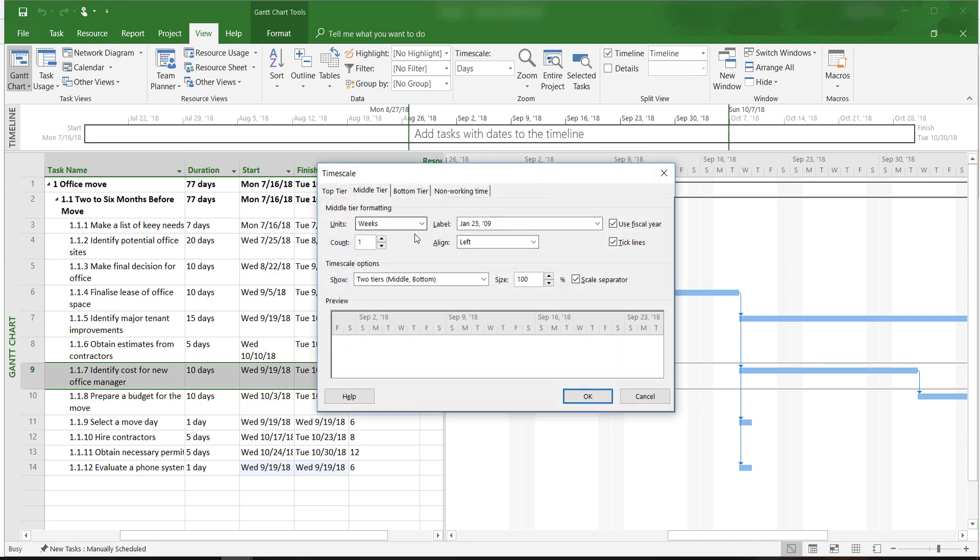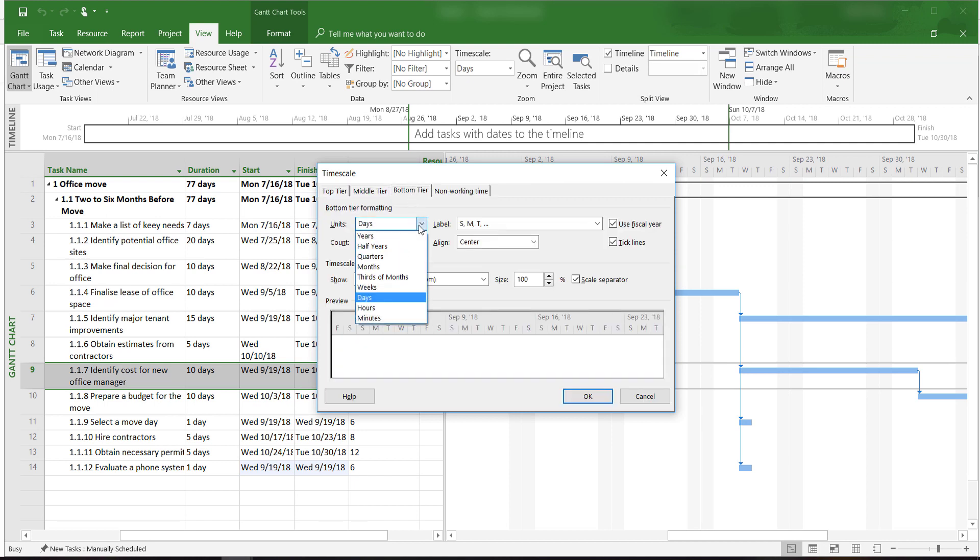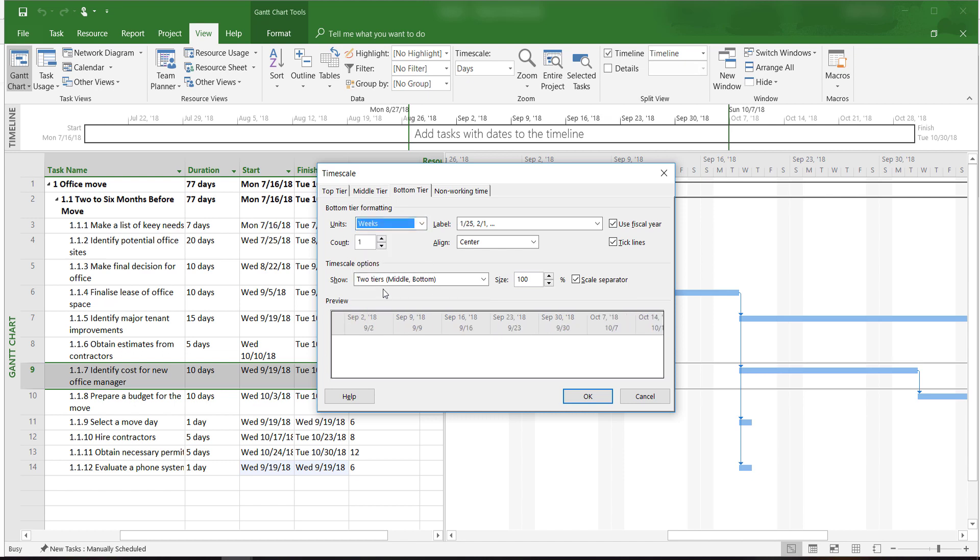We can see the current timescale if we click the bottom tier tab. It's now in days. Here, days means workdays. To change that, we click on this drop-down menu and click on weeks.